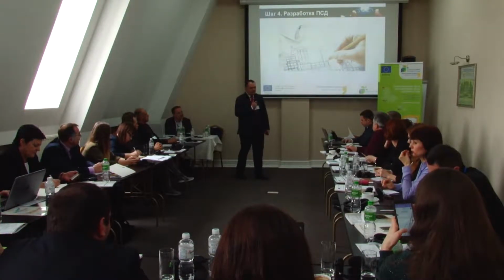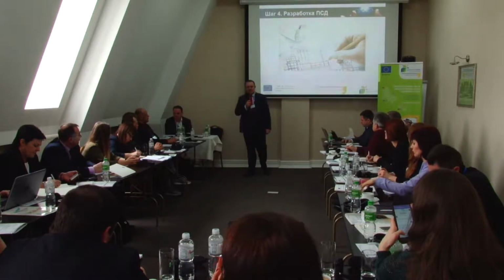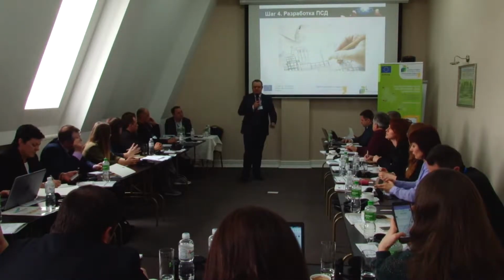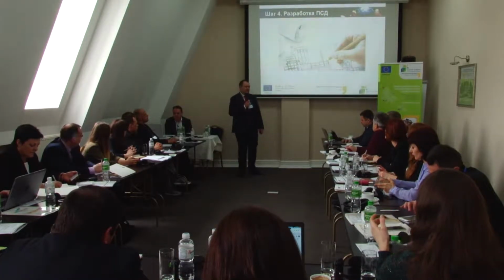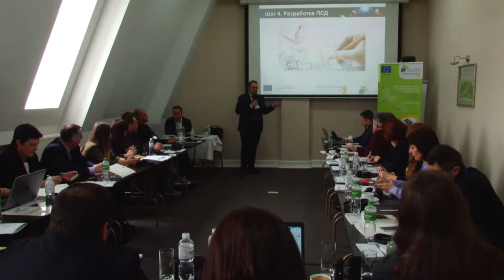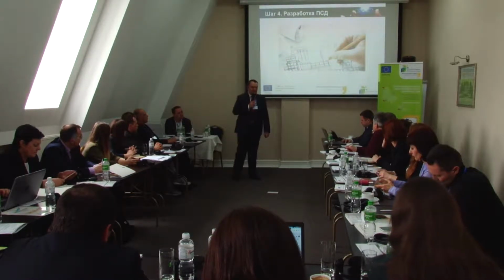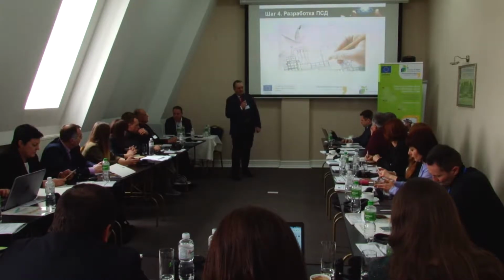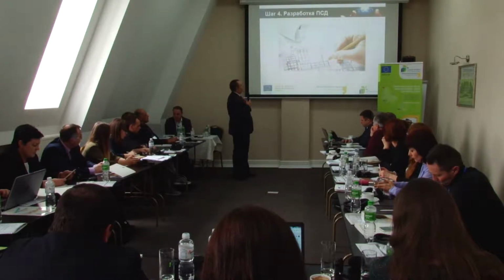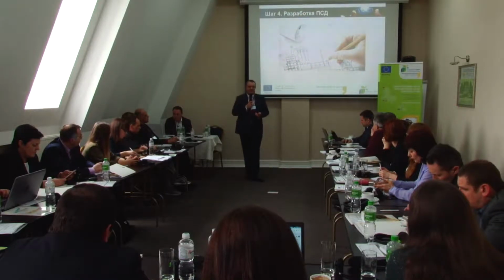In practice, this also takes at least 2 months, depending on the size of the project, because we may have street lighting projects and things are simpler with them in terms of technical solutions, while for thermal refurbishment projects, in particular for heating system projects, they are a little bit more complicated, and you have much more sections in technical design. Therefore, you need more time to prepare technical design documents.